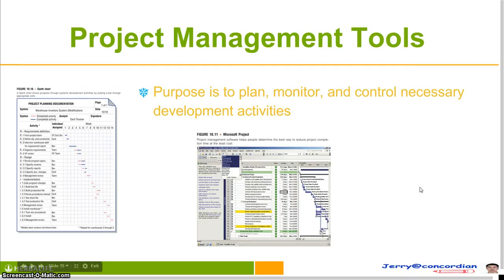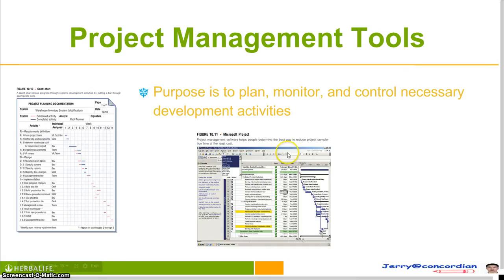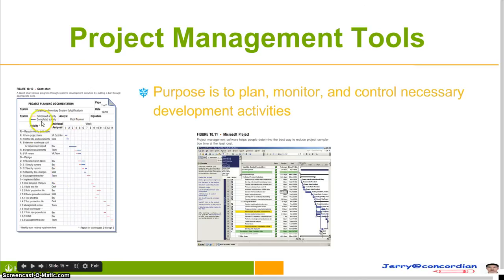Project management tools are used to plan, monitor, and control necessary development activities. One tool is PERT — Program Evaluation and Review Technique — which creates three time estimates for an activity: the shortest possible time, the most likely time, and the longest possible time. Another tool is the Gantt chart, which is a grid that lists activities and their date lengths.